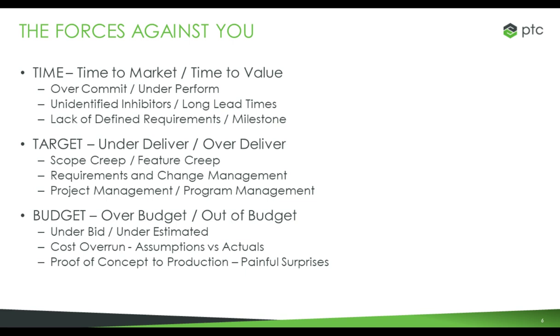It's easy to do on the digital side, where you can add things very quickly, especially if you have tools like PTC ThingWorx, being able to go into Composer and very quickly develop applications and try new things out. It doesn't impact a project that much there, but if you're doing scope creep and feature creep to the design of a hardware product, whether it be a board, a device, a widget, whatever it is, that can get very expensive and very time consuming, and you can find yourself going back and doing other iterations in some specific cycles. So those are areas where we see missing the target.